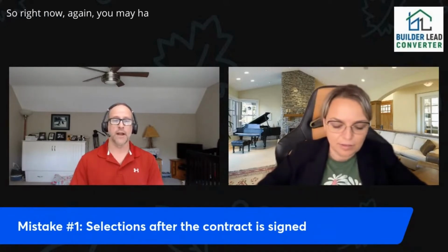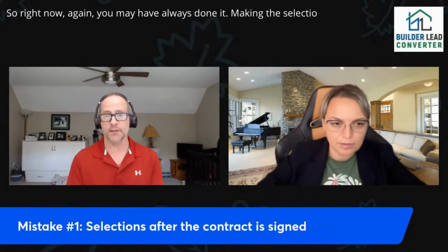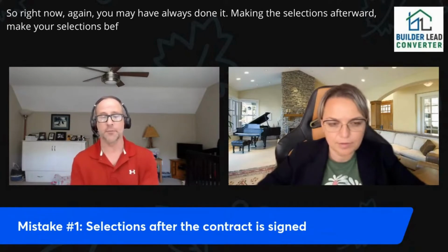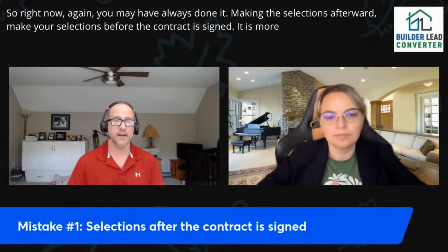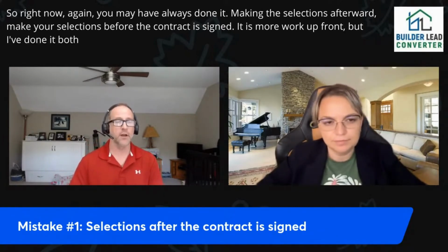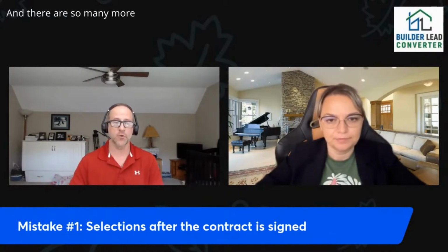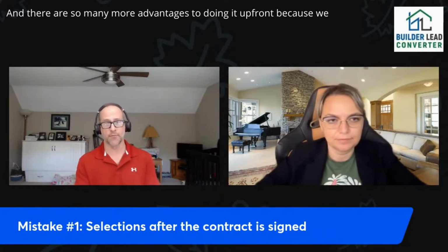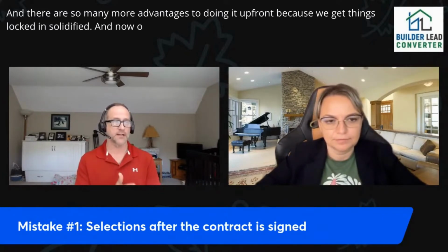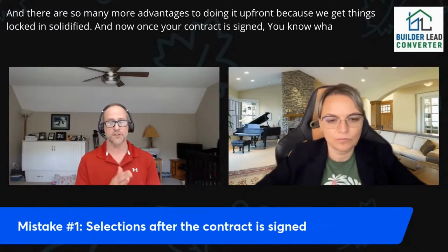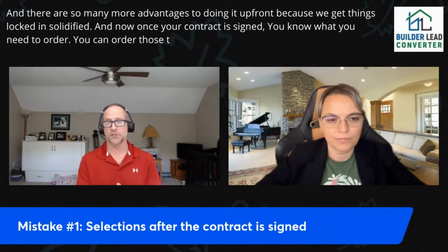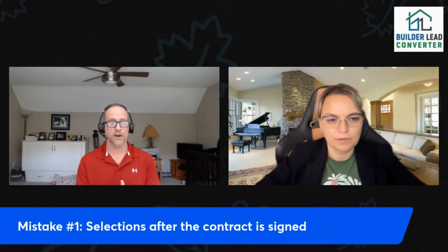Right. Okay, so right now, again, you may have always done it making the selections afterwards. Make your selections before the contract is signed. It is more work up front. But I've done it both ways in my career, and there are so many more advantages to doing it upfront because we get things locked in, solidified, and now once your contract is signed, you know what you need to order. You can order those things right away.